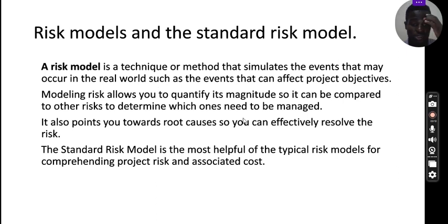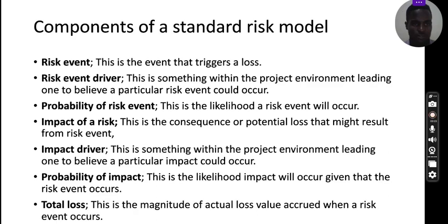Then we are saying that the standard risk model is the most helpful of the typical risk models for comprehending project risk and associated cost. Components of the standard risk model: we have a risk event, and we are saying that this is an event that triggers a loss. This is something that will tell you that this risk can really trigger a loss to my organization or to my project.